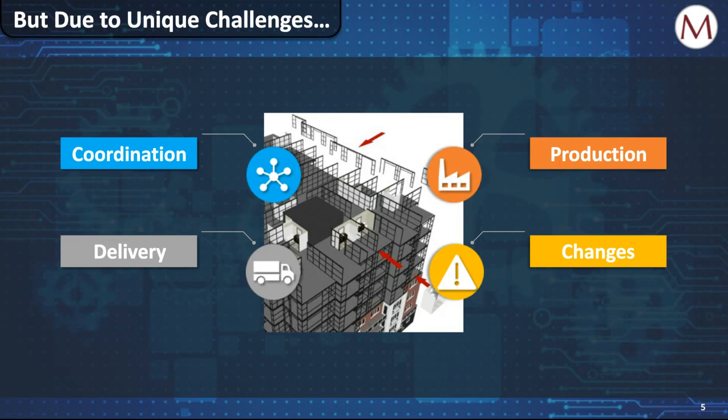The third bullet point, delivery. As all of this is now being produced more and more off-site, how do we coordinate the just-in-time delivery as it's coming to the job site? One trend we're seeing, really nationwide, more and more development in urban cores. What that means, very limited space to lay down material, to manage that material flow. So literally, material has to arrive just in time. How do we stage that? How do we manage that? And how do we coordinate that amongst the broader team?